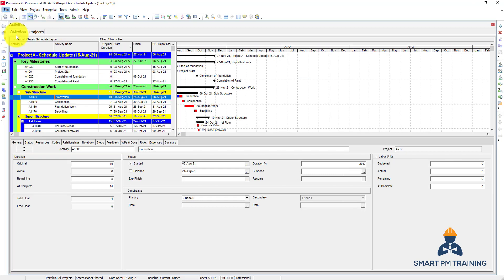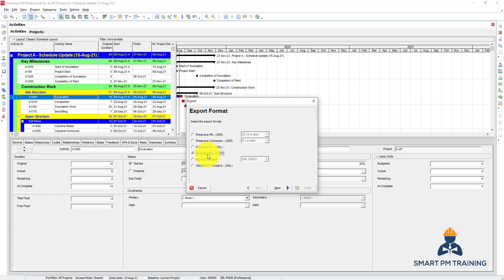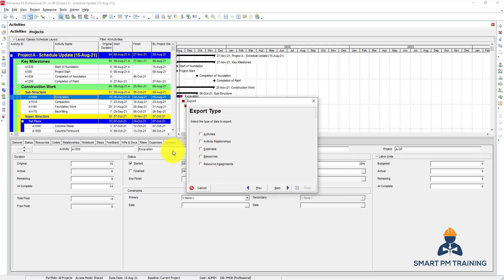You can also export to Excel, XML — which is Primavera's format — and also Microsoft Project. The two options you will most frequently use are the XER file for backup or team collaboration, and the Excel spreadsheet XLSX so you can use the data for formatting, formulas, managing data, and reporting. Click Next.